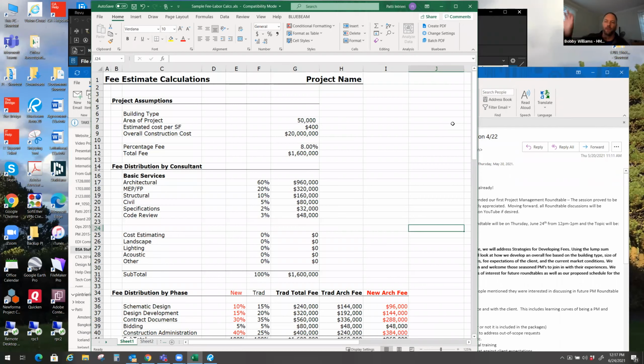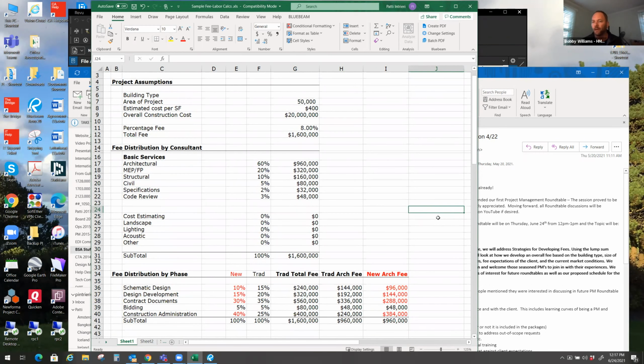Then we work through our fee by adding all of the principals and all the staff, and we see what we come out to be and how close we are to our targeted fee. So we have an initial comparison as a gut check to say, wow, we're way over on this fee, or we have a lot of room to move because we're way under our target fee based on how we think we can do the project. And like Laura was saying, we keep a lot of historic information, so we have a general sense, but that's our initial approach, top down versus bottom up.